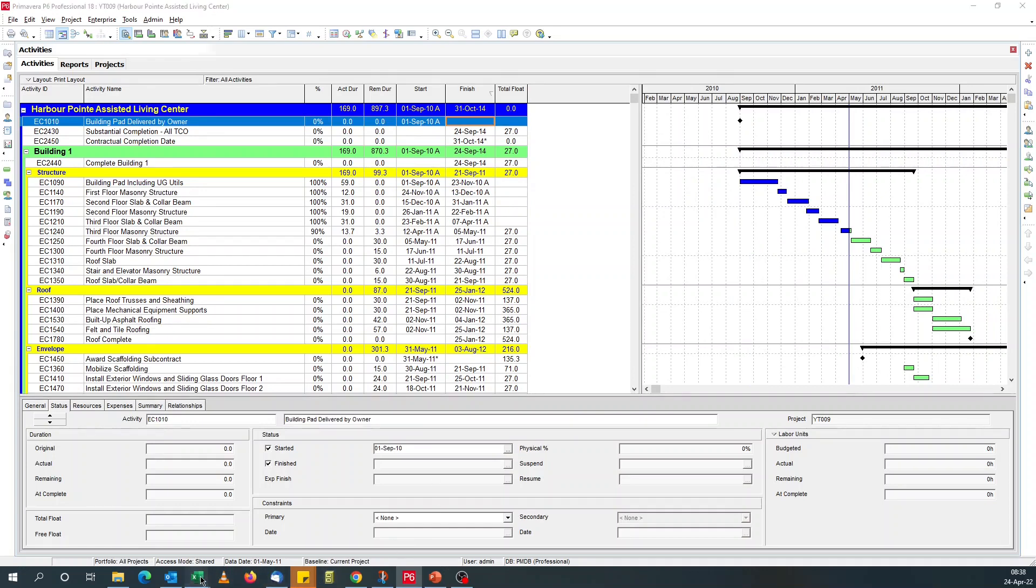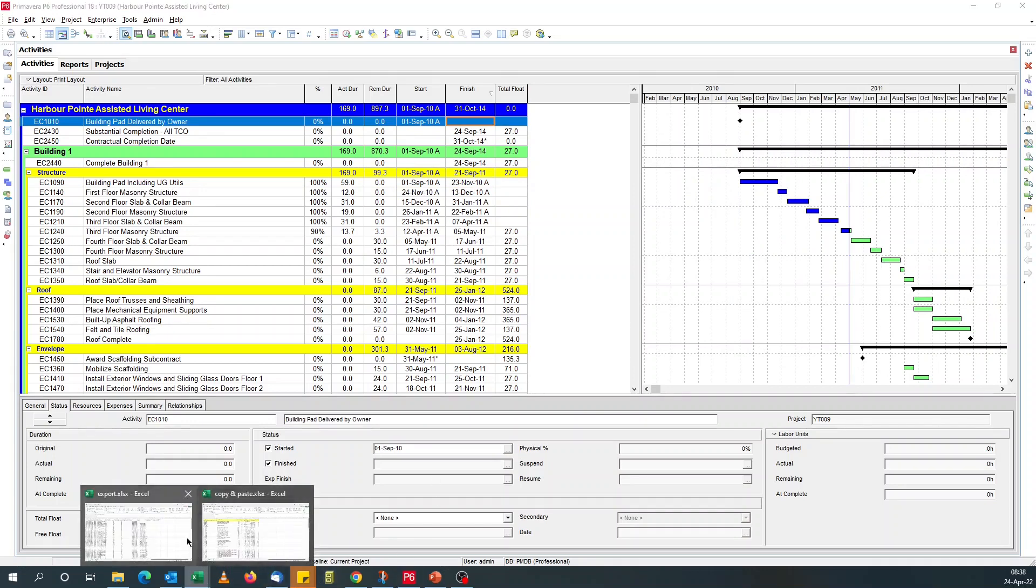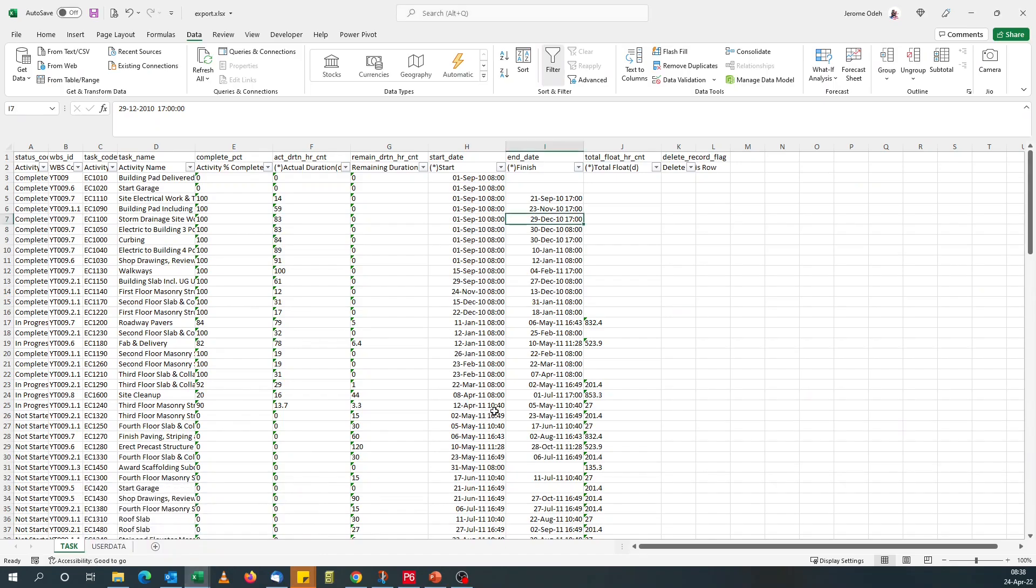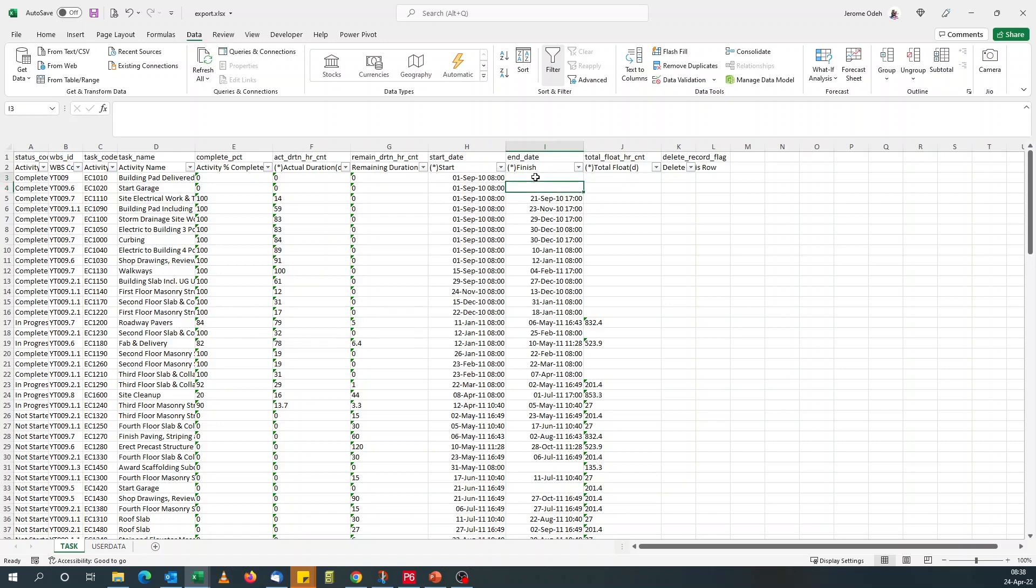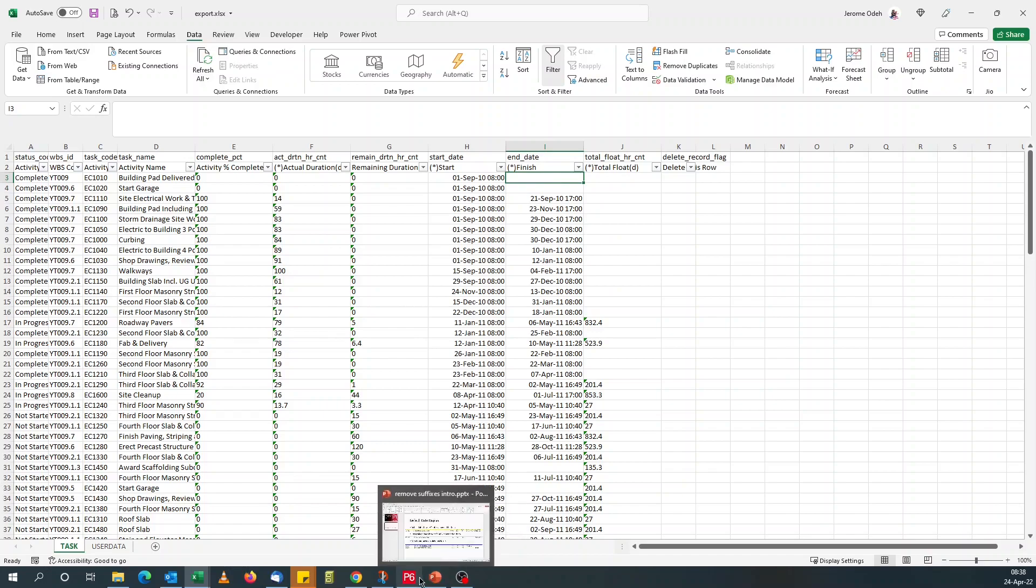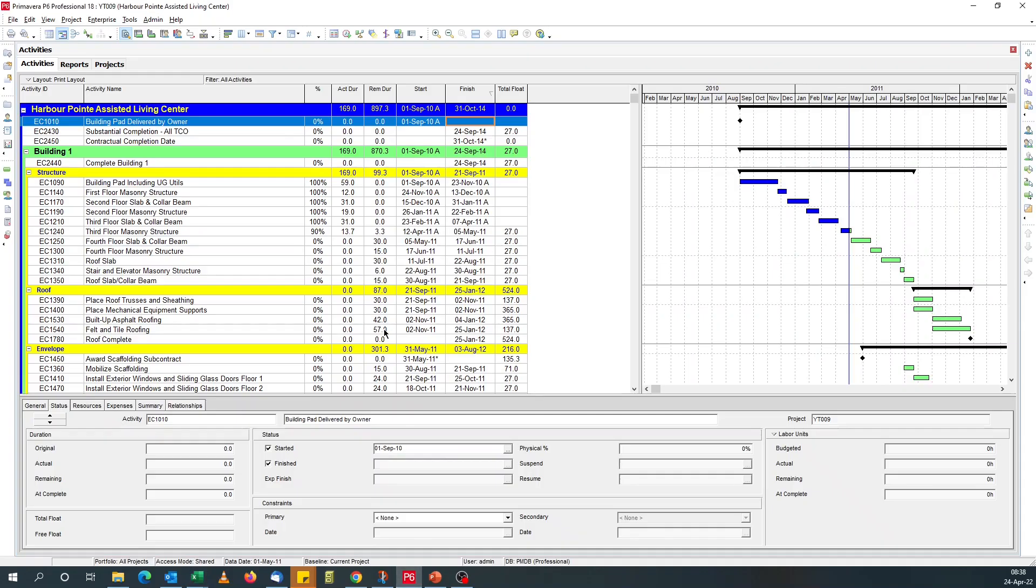And another advantage, before I go on, of not having any blank fields for the milestones is when you're setting up formulas, instead of writing if statements, you maybe just want to subtract start from finish date. It'd be good if this could be populated and straight off, we can do our subtraction or whatever manipulation that we want to do.